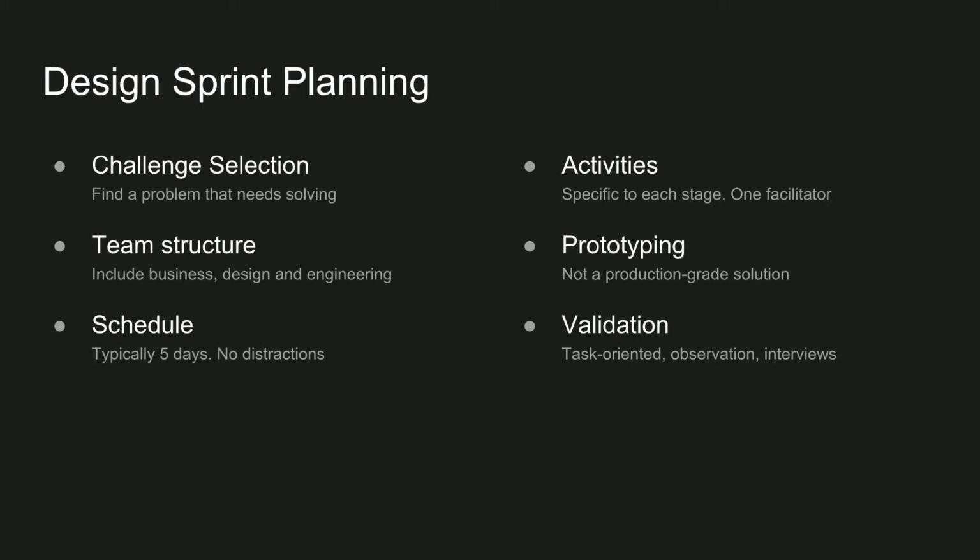And again, from a scheduling perspective, make sure that you know who the users are, because user selection for validation is also important. They have to be users who are engaged with that area of the website or with that area of the application, not just some random users that wouldn't even understand what the context of the problem is, and likely they won't provide any meaningful feedback.